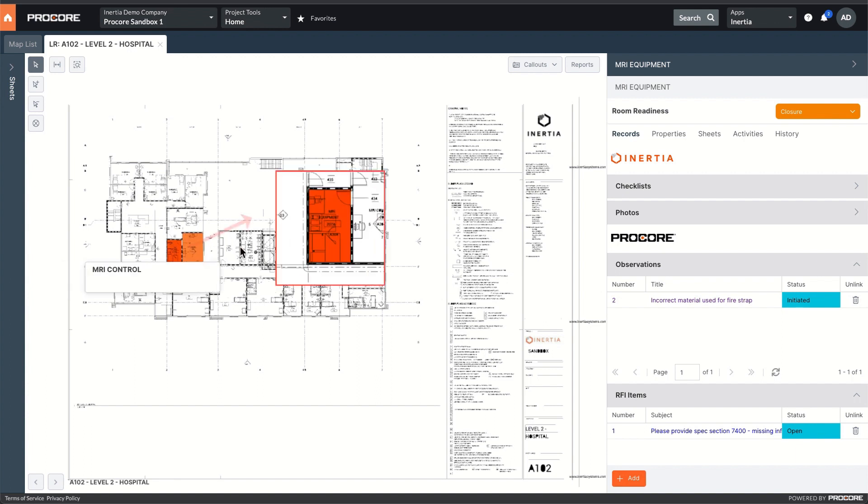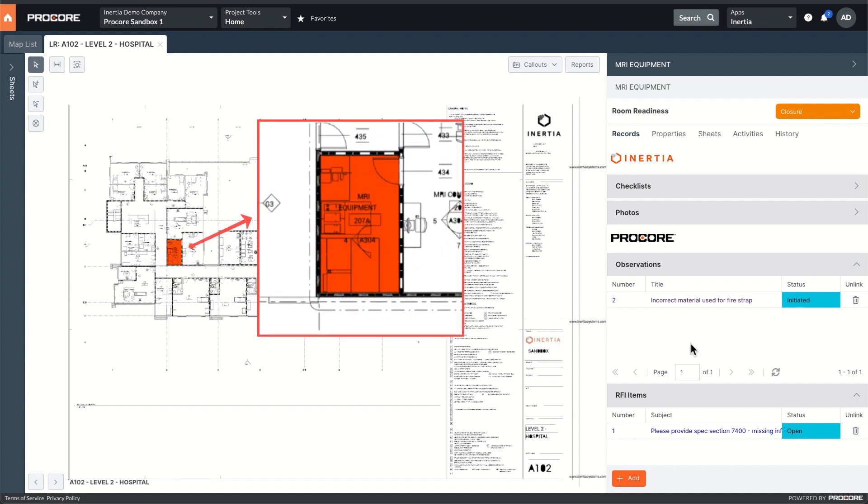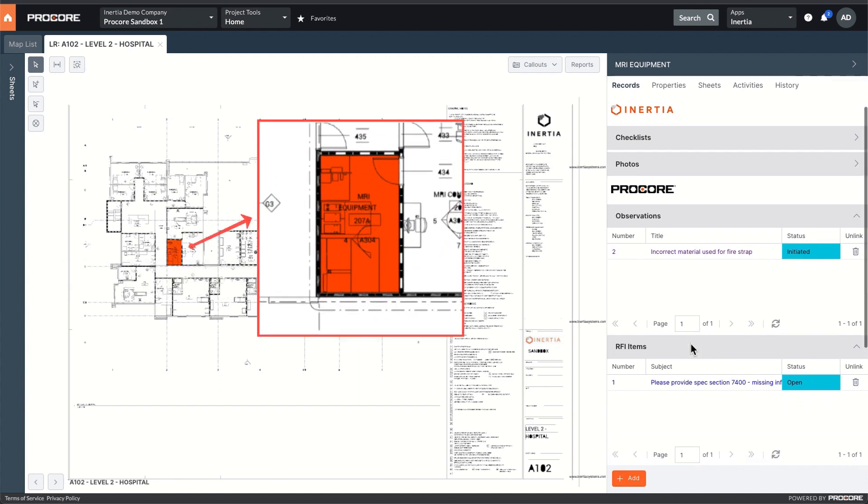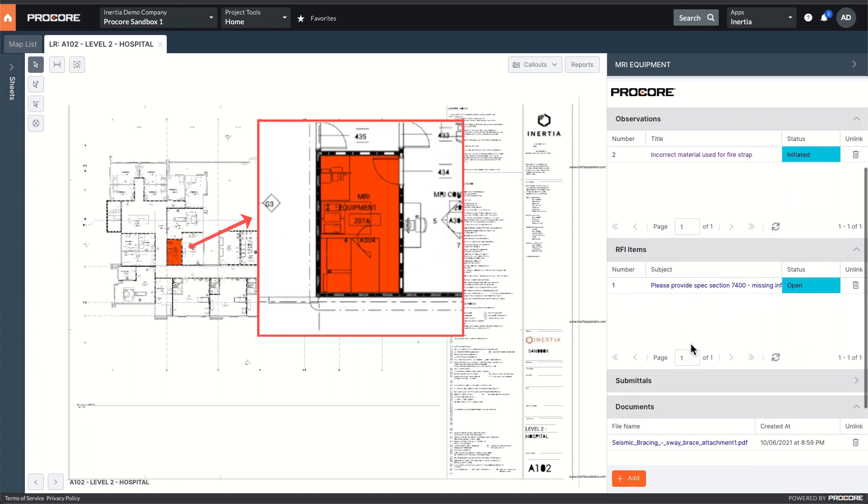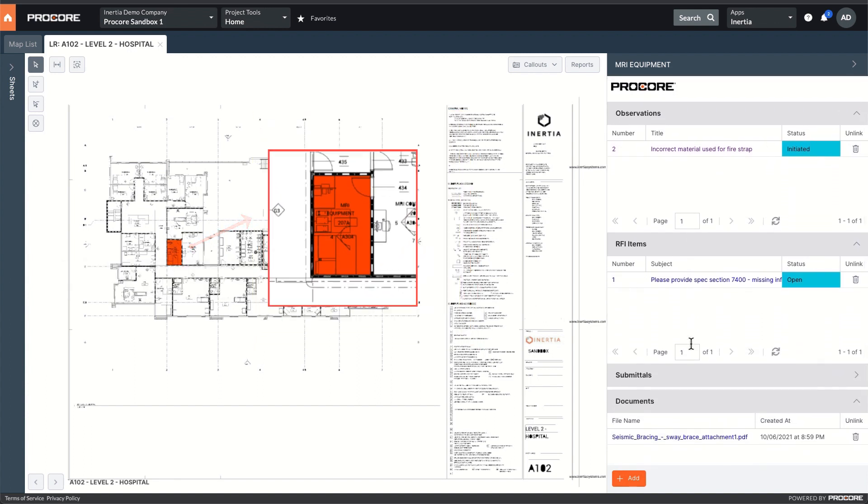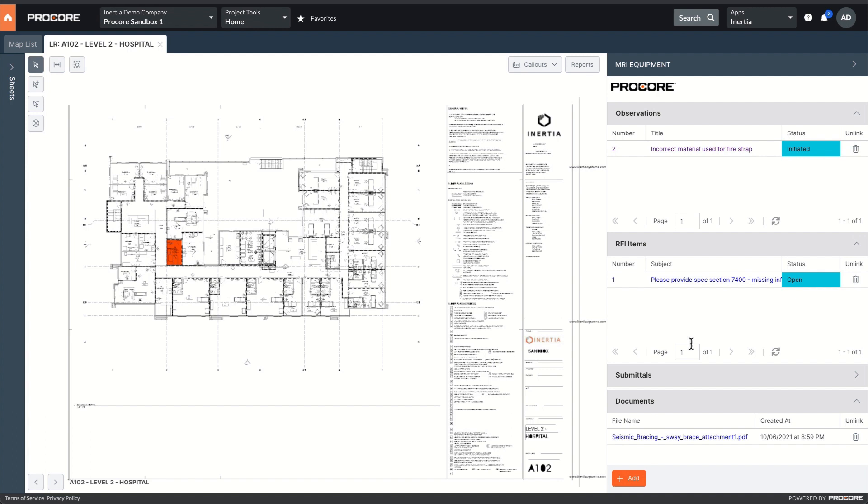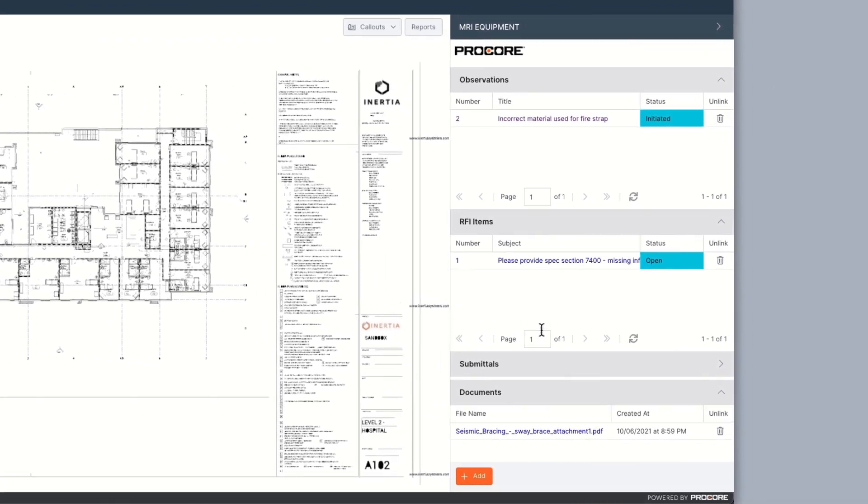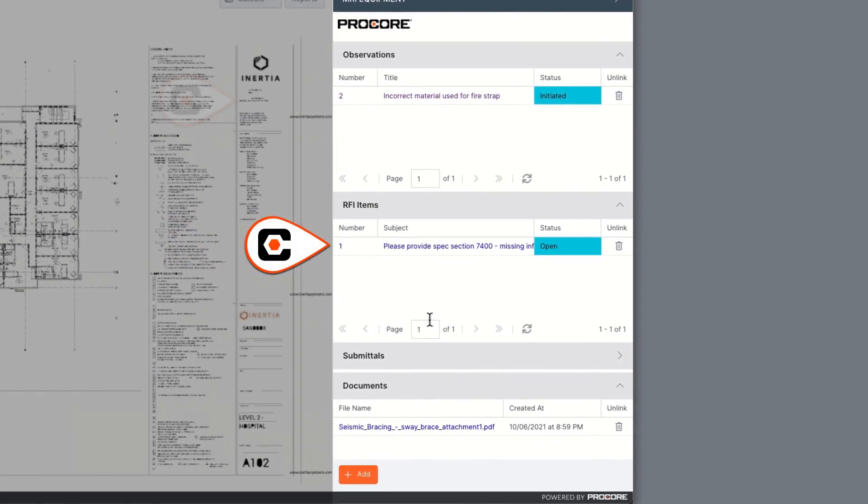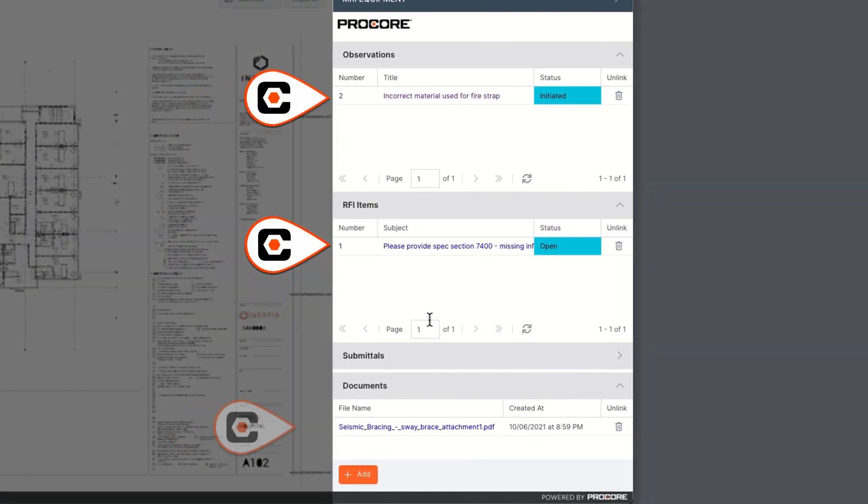With an object selected, I'm able to see across multiple workflows and gain visibility into all of the activities surrounding the building element. Here I see this room has a Procore RFI, observation, and document attached.